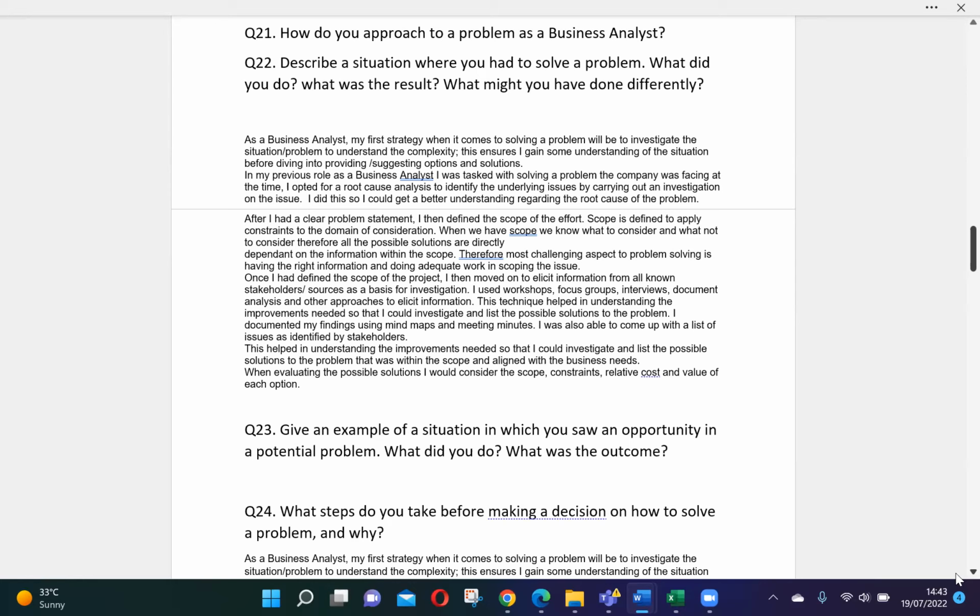So I did all my analysis and presented it to the customer, that according to me, this change can be delayed. If you need this change, the timeline will be impacted, the existing requirements will be impacted and delayed. This change also impacts other downstream applications, which need to change too, but they are not in a position to change right now because they don't have a release. So it's very difficult to do the change. I presented all this analysis to the customer.